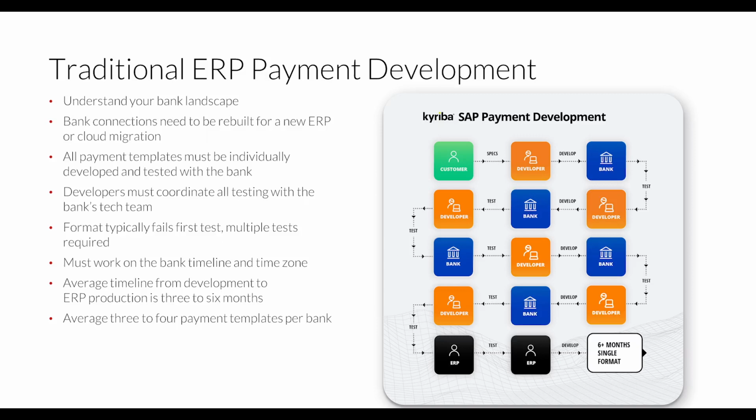As a treasury group planning the requirements, development and testing plan for your business's ERP project, you should understand and document your banking landscape. How and with whom do you work in your banking relationships? Where are your depository and disbursement accounts? What is your account structure? Do you utilize ZBA or sweep accounts? How do you account for these in your general ledger? Prepare a complete listing of all your accounts that you will be maintaining in your ERP or treasury management solution.